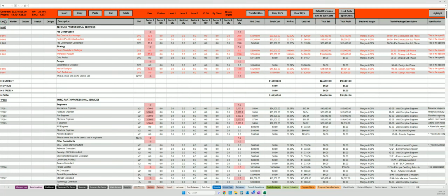So on the left is live metrics. So the user does not need to switch between tabs, switch between views to understand some high-level metrics on the project. The metrics that we're showing on the left, we're currently showing the contract price. So that's the selling number going through the organization's books as a contract sum. We're also showing the project number. So if you have built in items that aren't going through the books, such as by client items outside the contract, but you still want to report on it, it also shows the project value.